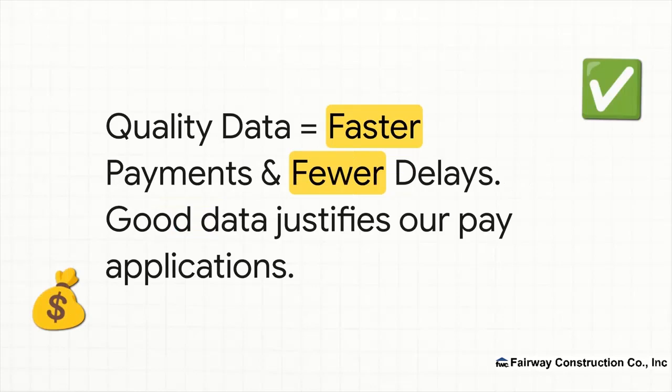And this brings us right back to that critical point from earlier. High-quality daily logs, accurate observations, perfect inspection reports. That is the solid evidence we need to back up our pay applications. Good data means we get paid faster, and we keep the project on track without financial hiccups.